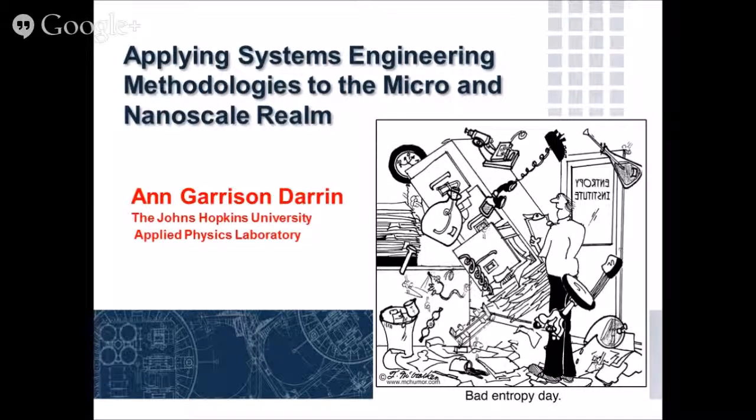So you're following a very formal procedure. Remember I mentioned about having gates. The Office of the Secretary of Defense has a program called Joint Concept Technology Development, which is the way you become a program of record. If you're a program of record with the United States government, they can buy more of you. It's a formal thing. Congress has to approve these things. So there are some formal gates where you have to meet and have these reviews with the user community and see exactly how they're going to do it and process through these. So you have an op evaluation, a technology demonstration, independent assessment.